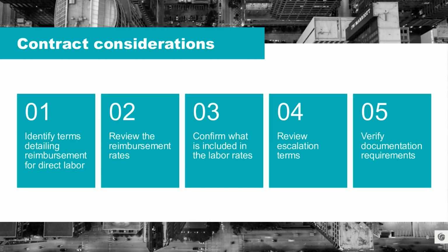Review the reimbursement rates. So once you've identified the reimbursement structure, review the actual rates themselves. Are they aligned with industry benchmarks, union agreements, or prevailing wage laws? Check for consistency across trades to confirm as well that premium rates such as overtime or holiday pay are clearly defined and justified. And in a few slides, I'll walk through a case study that covers performing a labor rate decomposition, along with the risks, impacts, and ways you can assess each area of cost.